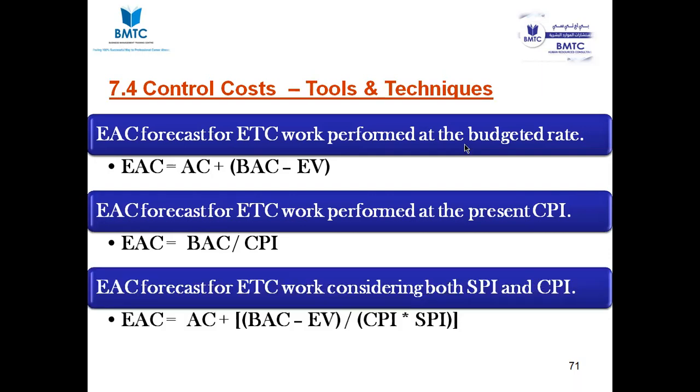Okay, this is where you're factoring in the Schedule Performance Index, right? Yeah, we have to consider SPI. Okay, the other one is that you need to do the bottom up ETC. They are asking you to re-estimate with the bottom up. Since the original estimation was flawed, using a different kind of estimation, the management is not pleased. So they are asking what happens if you re-estimate using the bottom up technique for the remaining work, for the remaining money. So that will be what? Actual cost plus bottom up ETC, right?